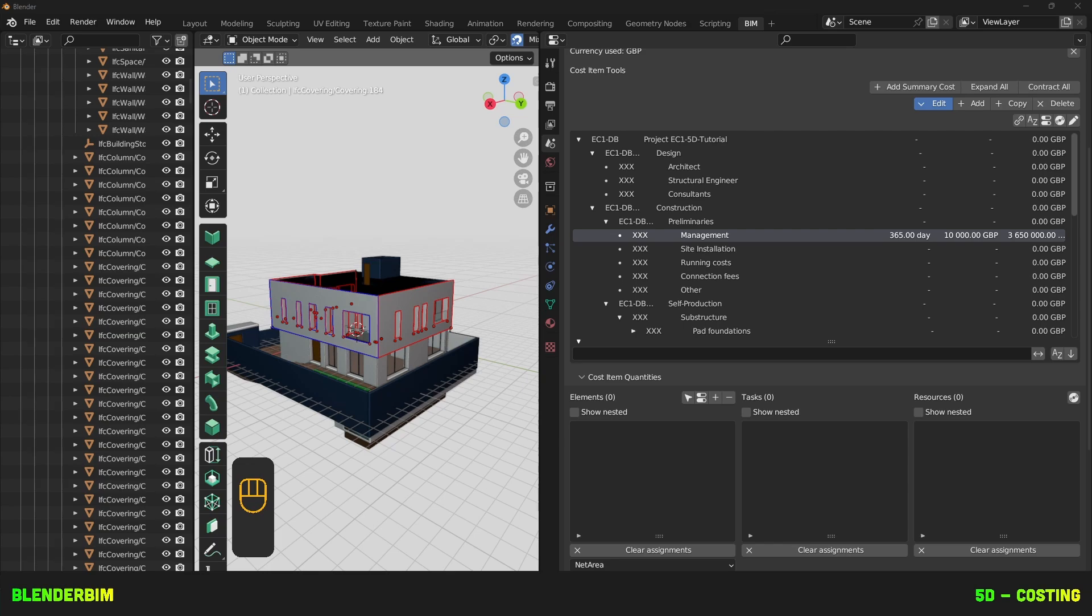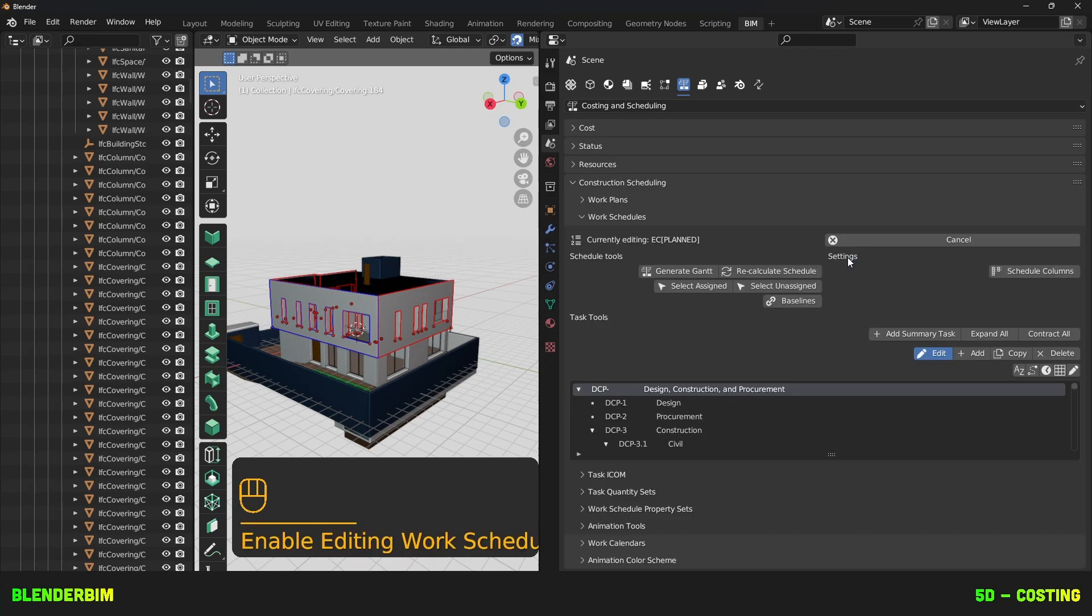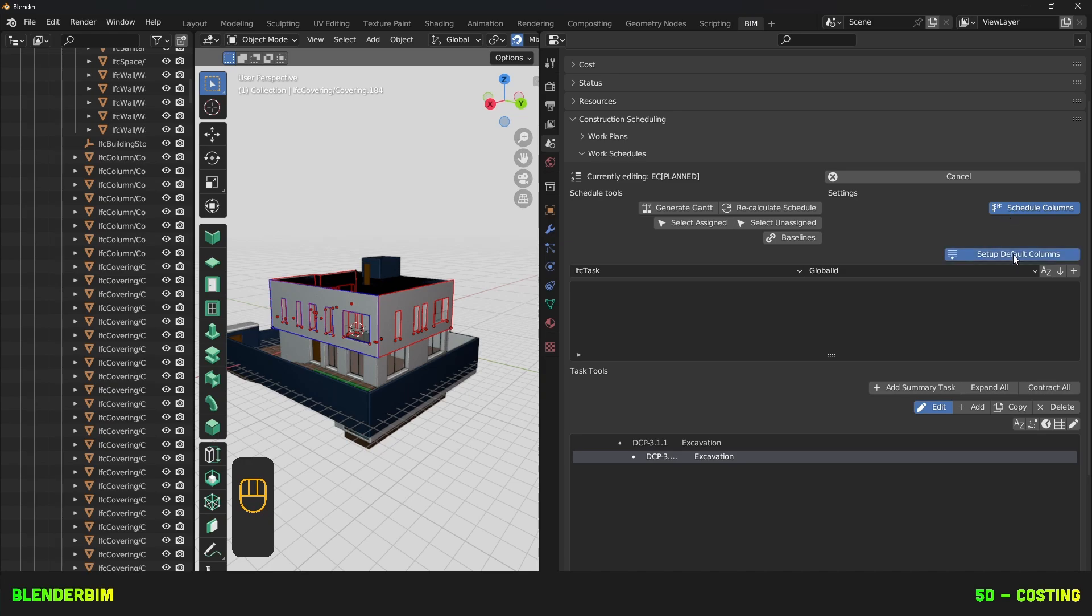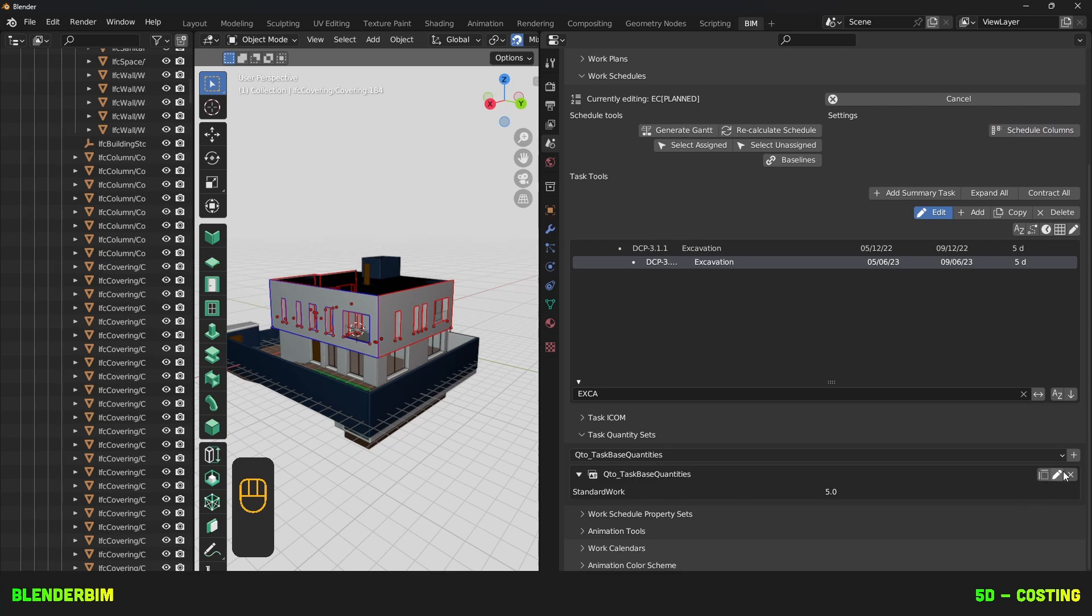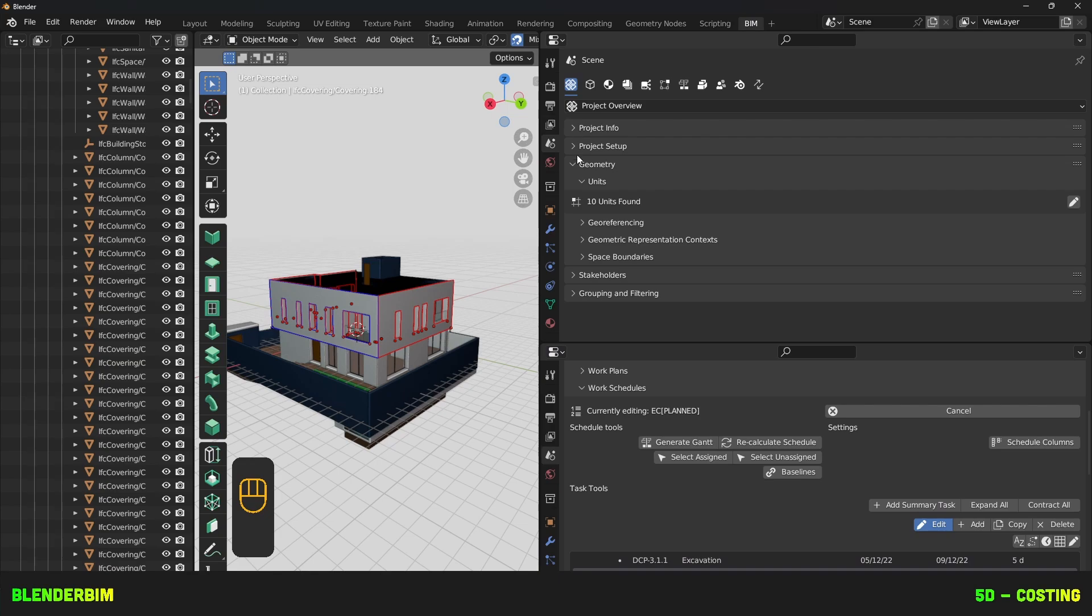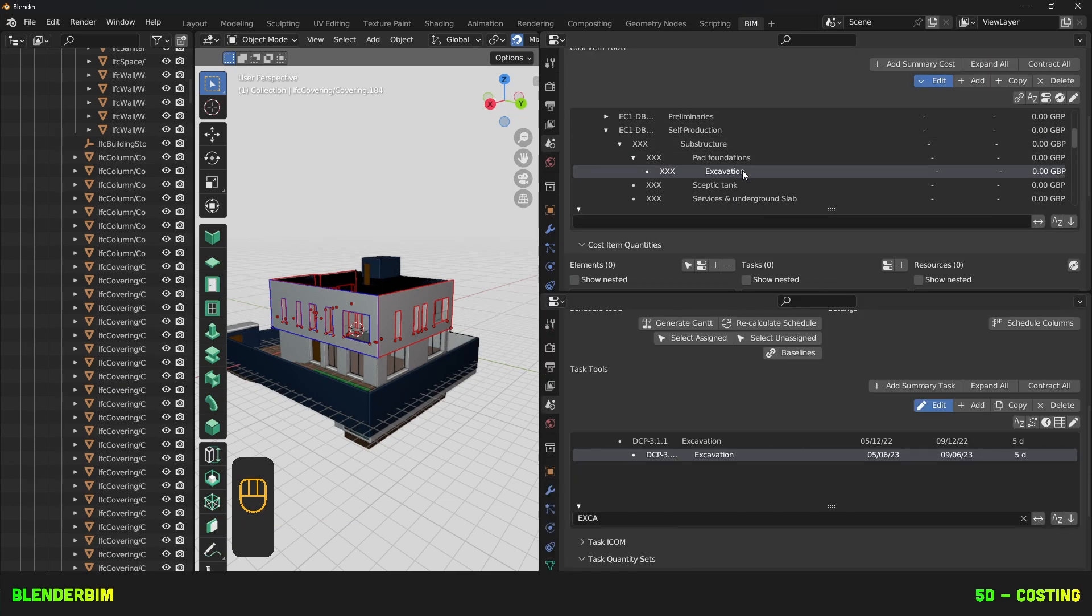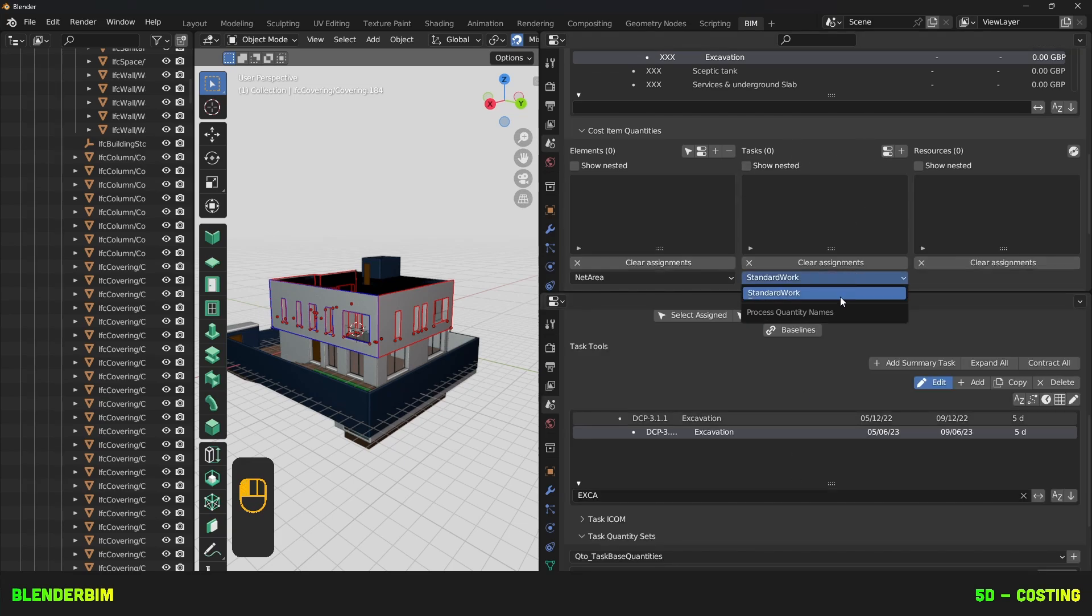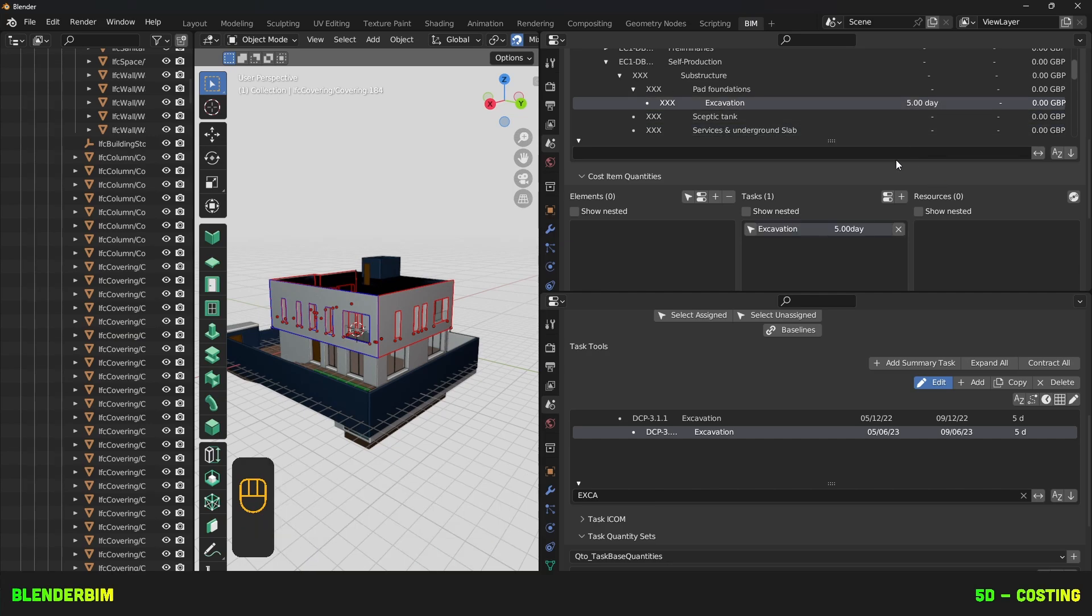So another way to get a quantity would be to use a task. Luckily, we have a work schedule with tasks that contain quantities. So let's say we want to use the excavation. I've selected my task here. I need to show my durations and whatnot. It's a five day duration. And does it have any quantity sets? Yes, it has one. Let's try and edit this. It has five for standard work and zero for overtime work. We'll keep it as such. Now, we'll open another tab here. And we'll go back to costing and scheduling, cost panel. So with our cost item selected and also our task selected, we'll look for the correct quantity. So we only have standard work. And then we'll press on the assigned cost item quantity. So here we have a five day quantity, which works just fine.